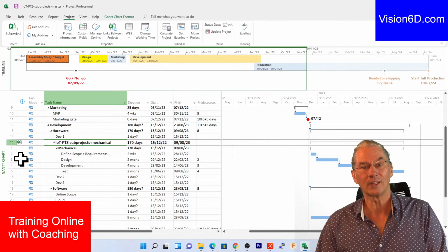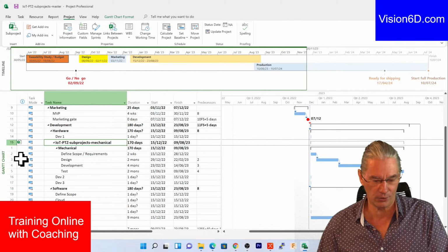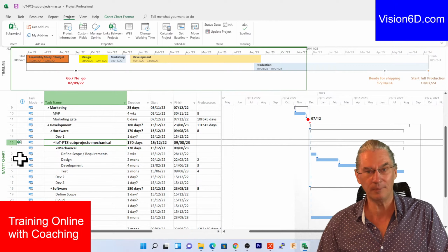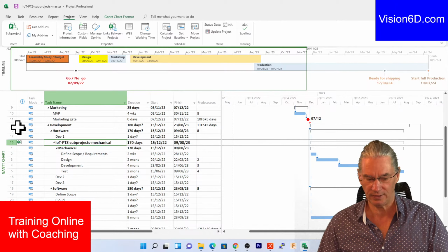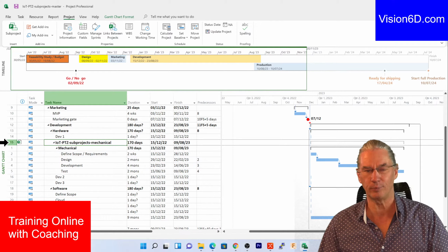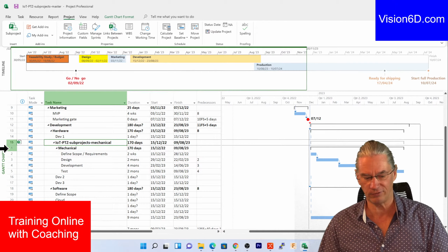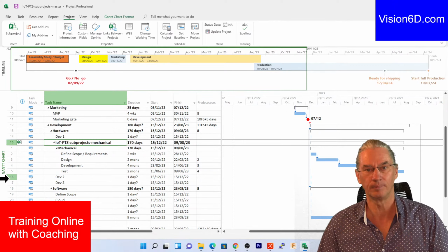Now, if we are talking about those details, maybe, and I'm sure that some of you have already noticed, the numbering is changing from task number 15. You see that the numbering here starts again from 1, 2, 3, 4, 5, and then jumps to 16.